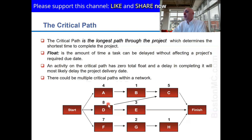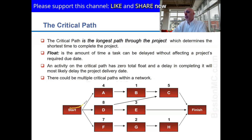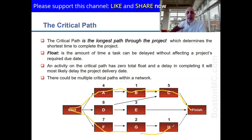If you treat this like a maze, there are network paths through the diagram. There's a path that goes from Start → A → B → C → Finish. There's another path along the bottom that also leads to the finish line. All paths need to be completed. Looking at the top path, four plus one equals five, and five plus five equals ten days total.